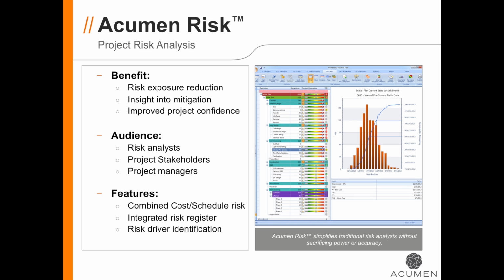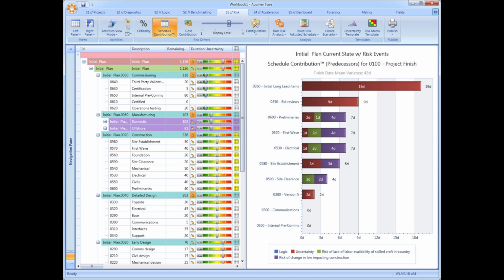In order to do this, we need to understand which risks on the program can have the most impact. Then, we have to determine which can be mitigated. Without this analysis, we're in the dark and may spend our mitigation budget on items which either have a low probability of occurrence or in fact may pose very little risk to project execution.